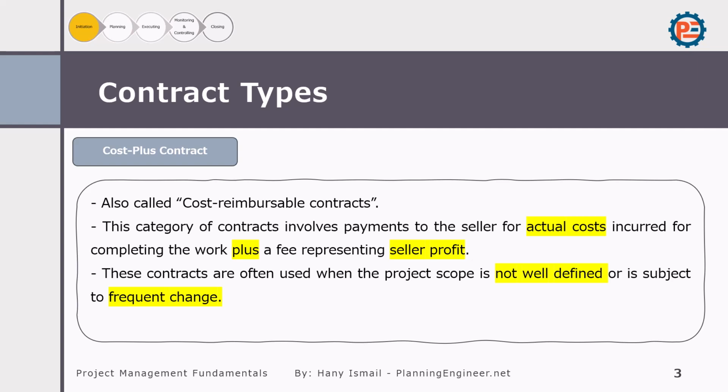The cost plus contract allows the developer to pay the contractor for all costs incurred, including unexpected repairs or specialized labor, plus an agreed upon profit margin. This ensures that the project can proceed smoothly even when new challenges arise.